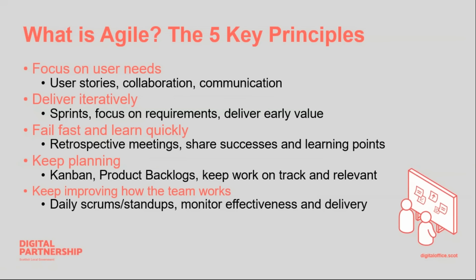We also look to deliver iteratively. Now, iterative is a word that I've used more this year than I've ever used in my life, I think. It's all about releasing stuff when it's ready. So we can do sprints, which are short, focused pieces of work that focus on user requirements. So we deliver early value. The idea being that as soon as you've got something ready that's usable and tested, we can roll that out and get people using it. So instead of waiting till the end of a project to get some value out of it, people are able to get value early.